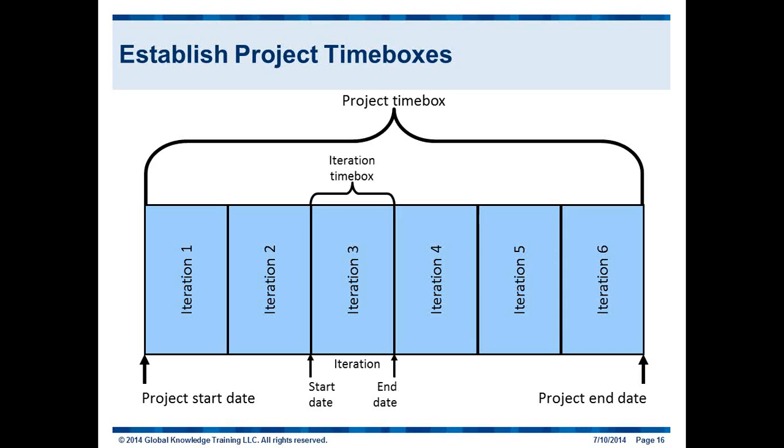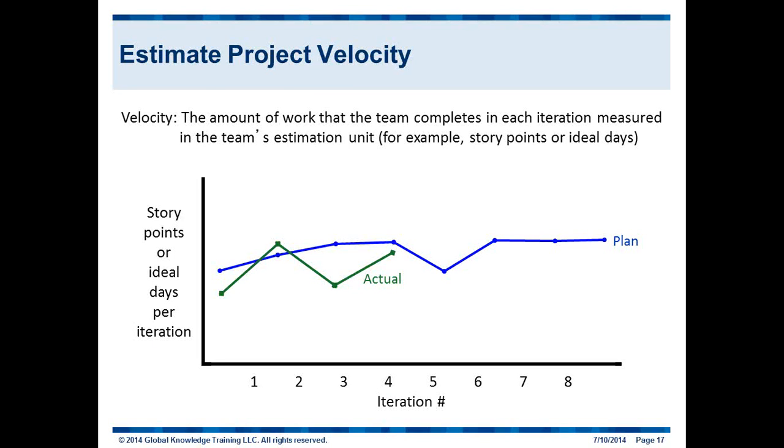How do we track progress on an Agile project? Agile teams use something called velocity. Velocity is purely an expression of how many story points we're able to complete per sprint or per iteration. As you can see here, we have our actual, and it ping-pongs up and down. And we're going to track it on an ongoing basis because our trend line, if you will, is going to be used to forecast when we think we're going to be done our project or finished certain features. Hypothetically, if we have 100 story points worth of work and we are finishing about 10 story points per sprint, simply do the division, and that's when all of the work is going to be complete. So Agile planning is actually super easy in that specific regard.